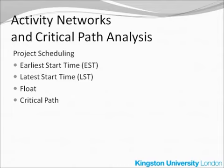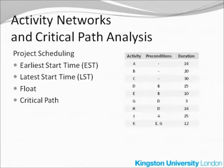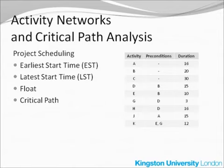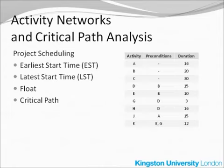To draw the activity network of the project, we need a list of all the activities. You can see them here, labeled from A to K. We usually don't use the label I, because it would be a bit confusing with J. For each activity, we determine the preconditions, or the set of other activities that must be completed before the given activity can start. As you can see, there are no preconditions for activities A, B, and C, which means these activities can start immediately after the project initiation.